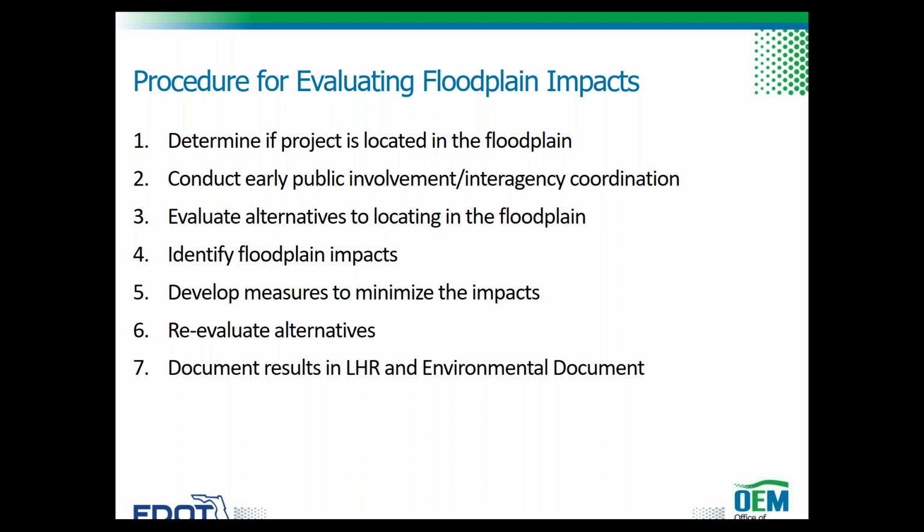Determine if a project is located in or will affect the base floodplain. Conduct early public involvement and interagency coordination with agencies such as local governments and water management districts. Identify and evaluate practical alternatives to locating in the base floodplain, including alternative sites outside the floodplain. Identify direct and indirect impacts of the project on the floodplain.